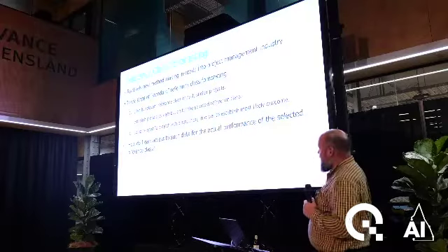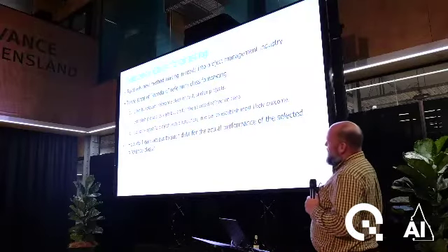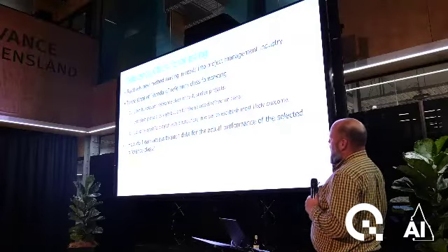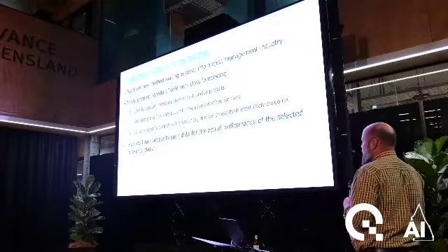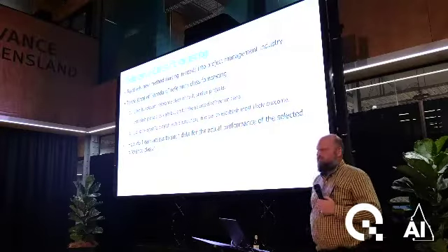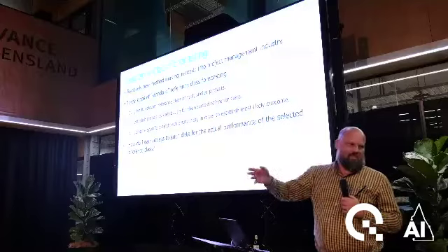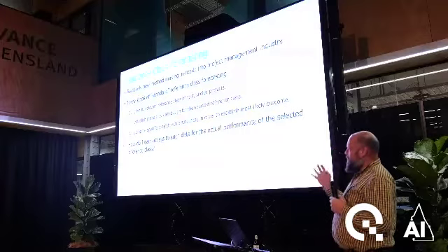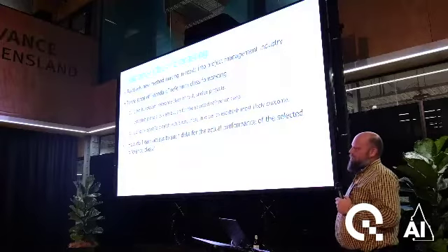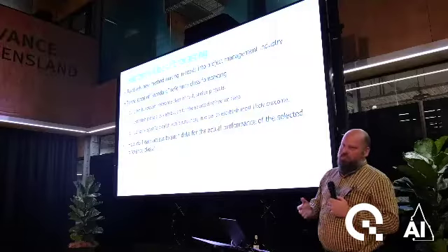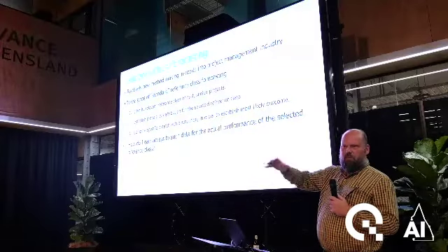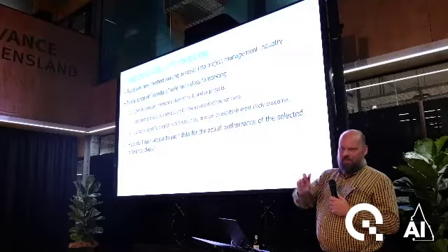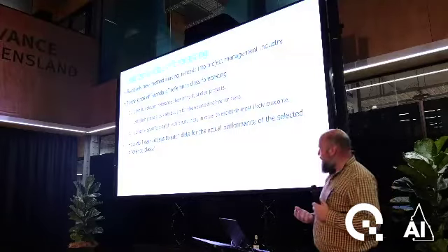So one new thing that's happening, and it's coming out of Oxford, is this reference class forecasting. What they try to do is identify a class of projects. So we'll have rail projects, civil projects, projects on roads, and other things like that. And then they'll group them together, and then they'll do some historical analysis where they'll say, this was the original budget and this was the final outcome. And then you'll get a distribution of cost overrun. So that's a ratio of how much more it costs compared to what the original forecast was.